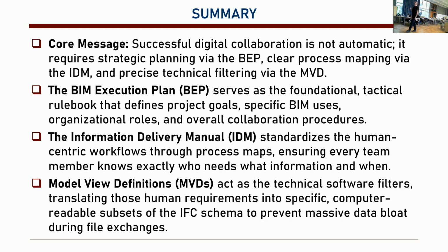And we also need to precisely, technically filter the data that we generate with MVDs. The BIM execution plan is the foundational tactical rule book. So we basically define the rules for each team: project goals, specific BIM users, organizational roles, how we collaborate. The Information Delivery Manual, IDM, standardizes the workflows of each team.